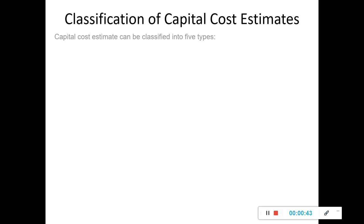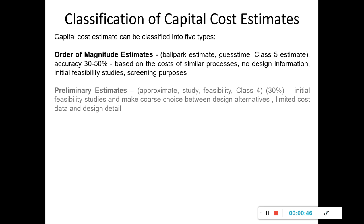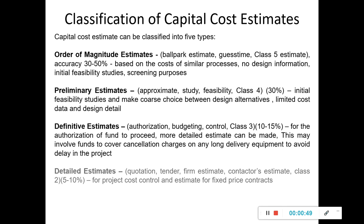So we know that we can classify the capital cost estimate into five types. In this course we will only cover the order of magnitude estimates, also called ballpark estimates. This is a classified estimate and the accuracy is only 30 to 50 percent, because this order of magnitude estimate is based on the cost of similar processes using historic data. We don't have enough information, and this estimate works as an initial feasibility study and for screening purposes only.